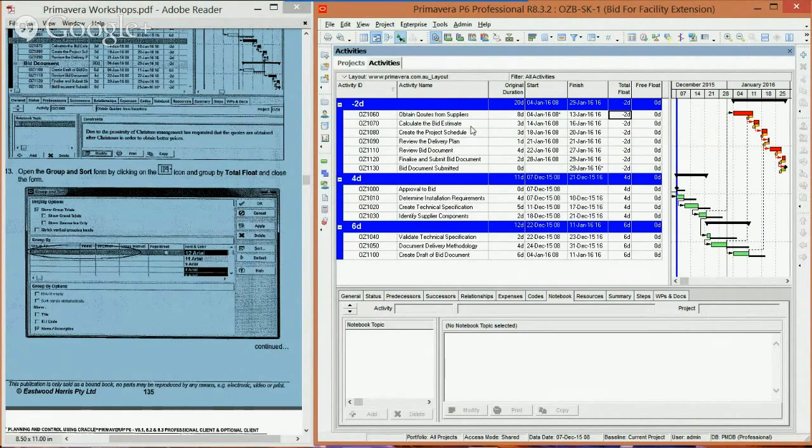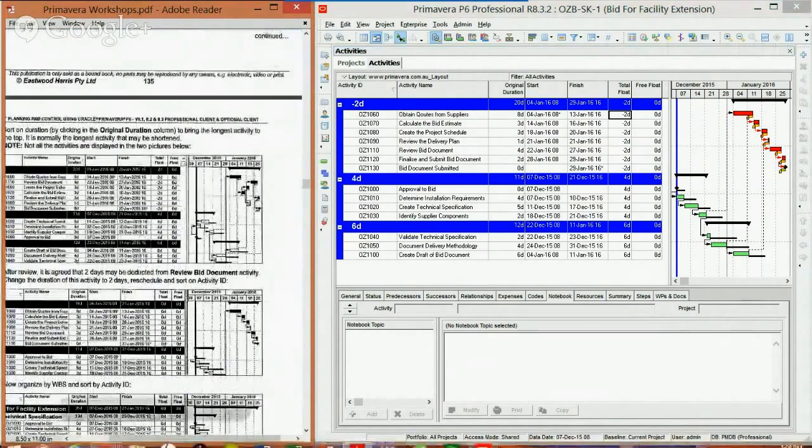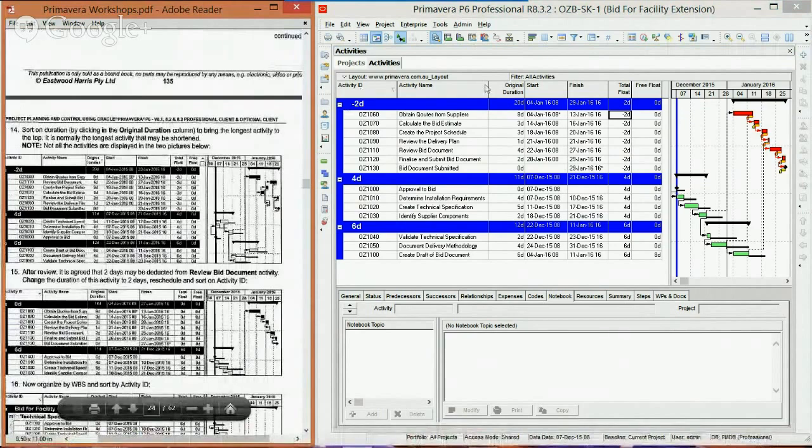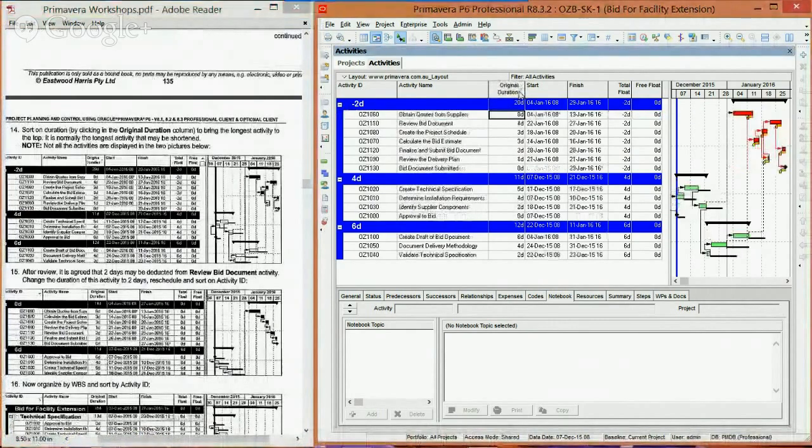And you can bring this up to your PM, engineer, planner, buyer, whoever is working in that specific activity, and ask, how can we do so? Where is it that we can lose 2 days in here? Now, one thing you're going to do is sort by duration rather than ID. So we're going to sort by duration, but you want to click it again so that it's descending, from the largest number to the bottom. So you're going to try to find out which ones have the longest duration, and this is what we can probably actually shorten durations on.